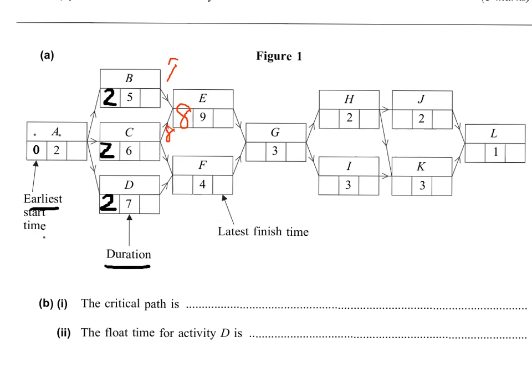So if two arrows are going into one activity, you need to choose the bigger one. Going from left to right, choose the bigger number.